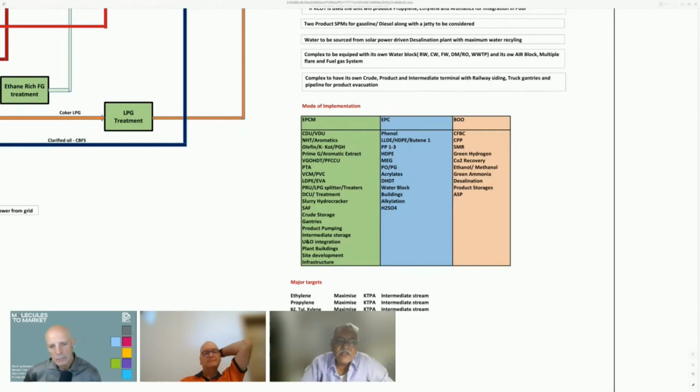So this feasibility report actually sets the direction of the project. Now here in India, we get a stage 1 approval on this. If the project is principally okay and the board is convinced with the technology, objective function, location, incentives, the order of magnitude cost estimates, and the project viability directionally, then a clearance is given that you can go ahead and now do what we call a DFR, Detailed Feasibility Report. In your parlance, possibly you call it FEL2.